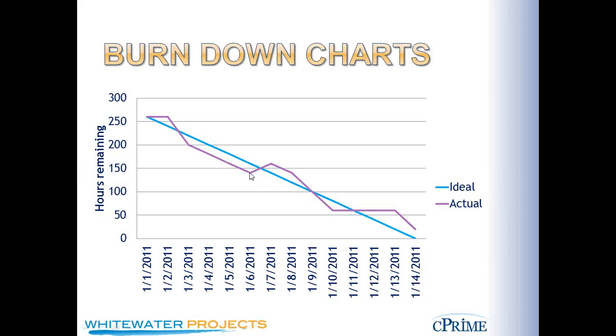But then something happens. And this is where the fact that it's the amount of work remaining is important, because a developer goes in and does a piece of work, and as they're working on it, they find out that what they thought was going to be a simple run-of-the-mill, if then else kind of piece of work is really a very complicated algorithm that's going to take them 8 more hours than they had originally planned. So they worked on it for 4 hours the first day, and it was a 4-hour task. So if we were just marking down the amount of work done, then you would just mark down 4 hours. But you don't. You put in there the 8 hours of remaining work, the work remaining.